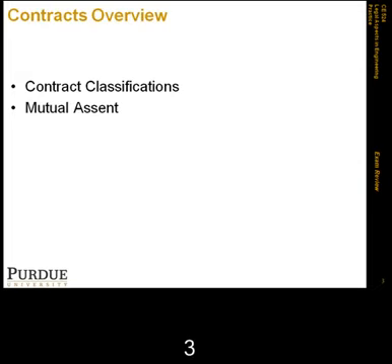In mutual assent, we also talked about certainty of terms, because that lets us distinguish between a firm, clear offer with complete terms and the negotiation phase. The certainty is also needed for allowing judges to determine the contract terms and what needs to be performed. For certainty of terms, we use the standard of reasonableness, where we require reasonable certainty, which doesn't say that all the terms have to be completely clear.